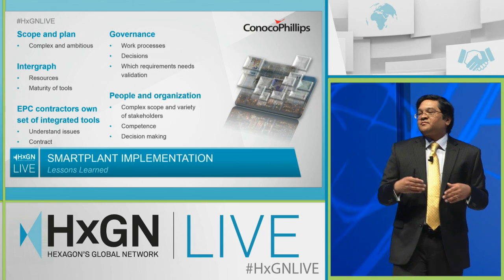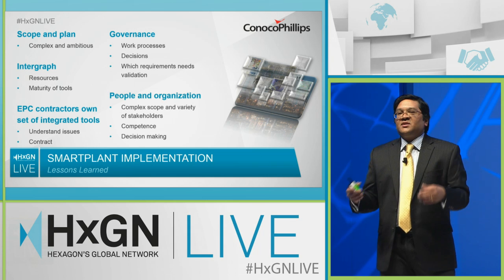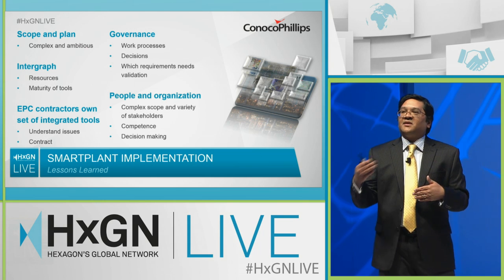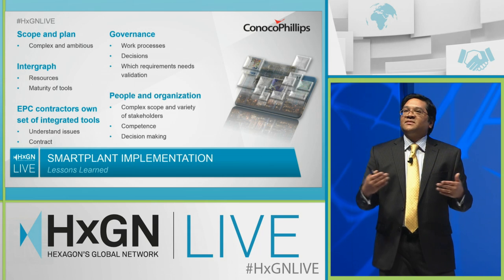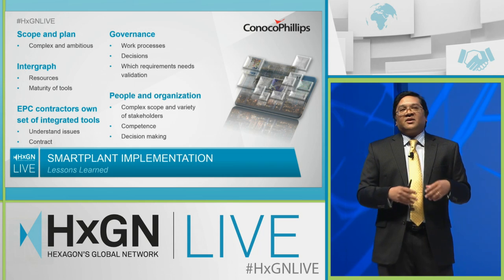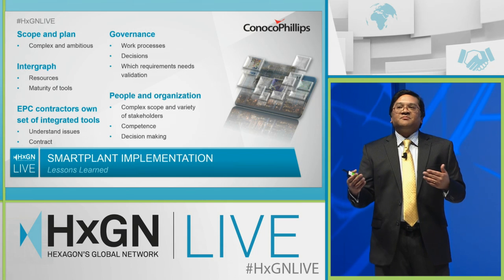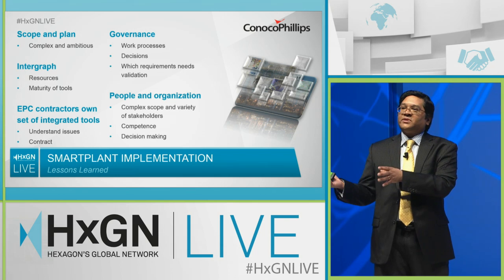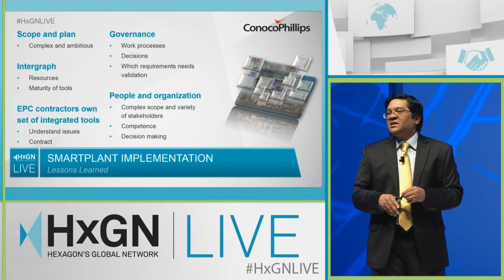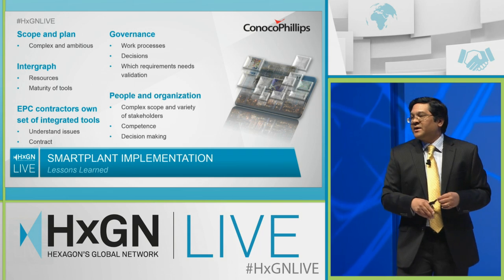So what we ended up doing was forming a steering committee comprised of information management, information technology, projects, and operations, so that we had decision-making in that unified functional body. And that made it much easier for us to sell the implementation of intelligent data and to bring the organization along with us. And finally, we learned a lot about people and organization. The complex scope of this work required that we really redefine some of the roles we had in the company. Smart Plant requires a different skill set than the guys answering the help desk and helping people set up printers, right? We need different skills, we need different outlook, we need different capabilities. So we need to get that level of competence up in our own organizations. And we consider Intergraph a key partner in doing that.